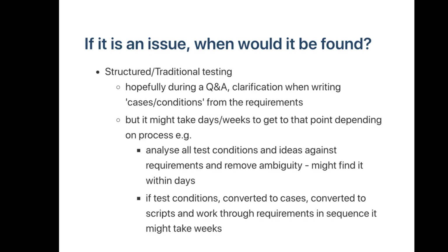Very often in those kind of projects, you would track all your questions and then every couple of weeks have a meeting to clarify questions. But you'd be working on those assumptions, so you'd have a lot of waste and rework. So one of the issues with a very tight scripted process is that these kind of problems can take a long time to find. Someone has to go away, get the answer. Then there's a big discussion in a meeting. Should we do this? Then someone has to bring in the designers and the analysts, and it can take a long time to get this stuff fixed.